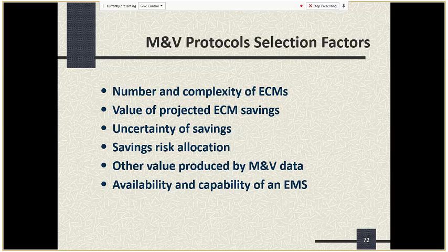In this case, I think about 90% of HVAC savings are guaranteed compared to what was projected in the IGA, and about 95% of the lighting savings are guaranteed compared to what was projected in the investment grade audit. So therefore, there is a safety margin. And you're looking at, well, if there's a small shortfall compared to what the IGA said, you're still going to make your guarantee without a problem.